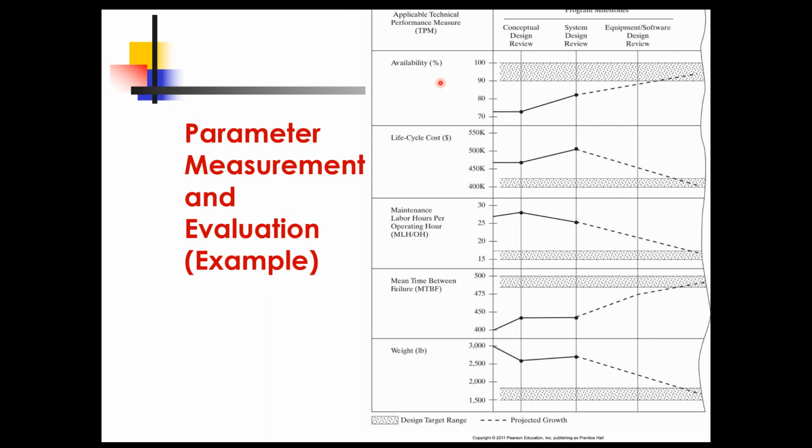So you can have that shown here, and as you go through your design system and even further into the actual detailed design development of the engineering of the product, you can check where you are according to the data that you have for each of those technical performance measures, and see how you are tracking and hopefully converging to the target, because this is your specification.